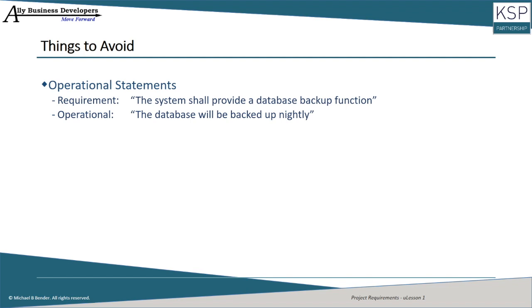Notice that I delineate the statements by changing the verb. The requirement uses the verb shall, while the operational statement uses the verb will. Note that operational statements are frequently called user stories. Asking the customer to create user stories is a very effective method for creating requirements, especially with systems that have a high level of user interface, such as apps or websites. However, these are not requirements.